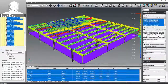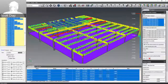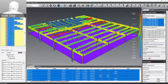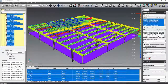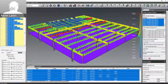One thing worth mentioning from the last webinar: regarding alignment of the model to the point cloud, we highly recommend it is already pre-aligned with survey control prior to importing to Build-It. If you're working in a fabrication shop, we do provide methods for auto-aligning. In this case, the model was already aligned to the point cloud using survey control and imported to Build-It — that's the recommended method. Build-It does have the capability to align the cloud to CAD as well if needed.